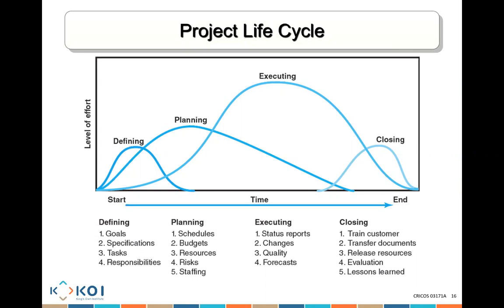When you talk about closing, how do you close a project? Well, if I finish something, I need to give it to my client. So closing is about training the client. Closing is about transferring all of these documents to the client, releasing the resources that were working on a project to work on another project, evaluating how we actually delivered the outcomes, and learning what we have done right and what we have done wrong, so that we don't repeat the same mistakes.